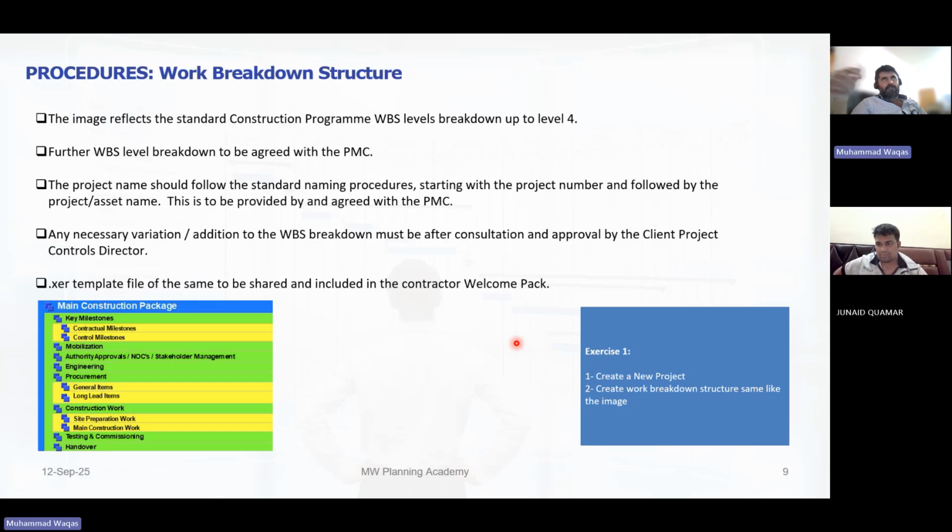Because as a planner, you will see there is a date of 30 April. You will say, okay, I need this finished by 15 April. And to the management, to everybody, you will say 15 April we have to finish. And once you go to the client, you will say the finish date is 30 April, but internally we are pushing for 15 April so that we have a buffer of 15 days.